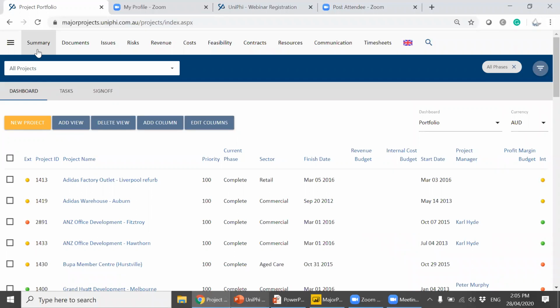For example, we have a client where we pull in public holidays from a different source, and we connect those to the financial calendar, and you're able to then exclude those days from utilization counts on both timesheeting and resource planning. But essentially, the majority of the data is captured in the UniPhi database through the UniPhi interfaces.